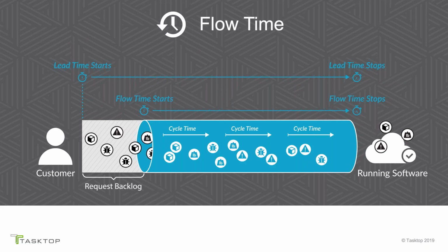One of the things you could track, and one of the things that is a topic of conversation between different teams, is time. Is it lead time? Is it flow time? Is it cycle time? So cycle time in the bottom in the blue is more of that development. Something came in, I worked on it, something came out, I'm done. And then it went to the testers. Hey, it came in, I tested it, I'm done. Then it went to the release people. Hey, it came in, I released it, I'm done. So that's cycle time, in and out in each of the individual tools, individual teams.